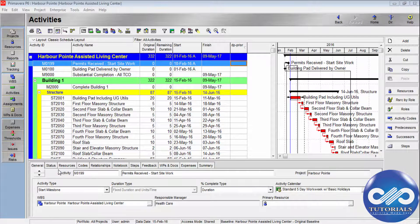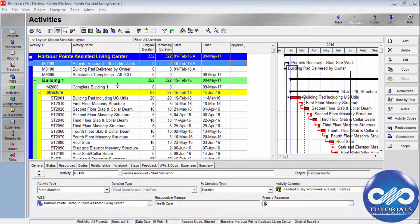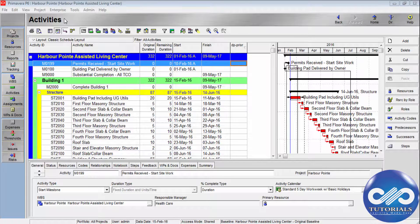You may customize an unlimited number of UDFs in any of the calling subject areas like activities, activity steps, activity resource assignments, resources, projects, WBS, expenses, issues, rates, and project documents. The major data types of these user-defined fields are text, dates, number formats, cost, indicators, and integers.